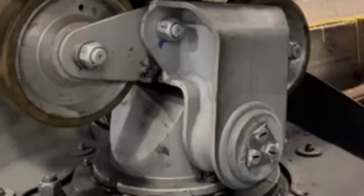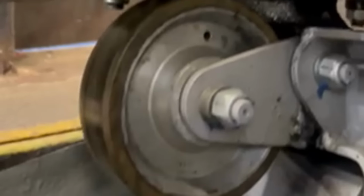And I would sit there and just pick the train apart. I would go through and find little things wrong with it all over the place and say, fix this, fix that, fix that. You would think, well, how often does that happen? Constantly. When you work on something constantly for 2 months at a time, 3 months at a time, the stuff that you think would be blaringly obvious blends in. It's not until you get someone like me out there, not saying I'm better than everybody else, definitely not, but when you get a separate person out looking at the stuff that you just did, they see the stuff, like, you missed this.